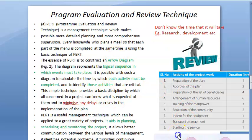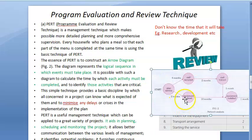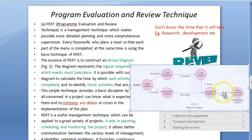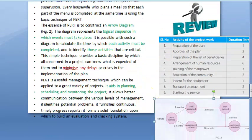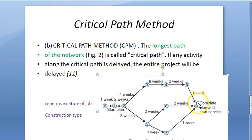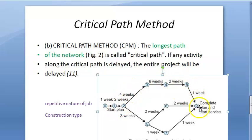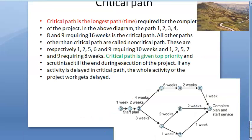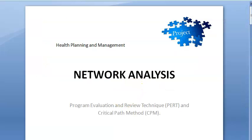In PERT, you use an arrow diagram, sequence the activities, and want to minimize delays — you can plan, schedule, and monitor the project. In CPM, similarly an arrow diagram is drawn, but whichever path is taking more time is focused on more. The path from start to end that takes the longest time is the critical path, and if it gets delayed, everything gets delayed.